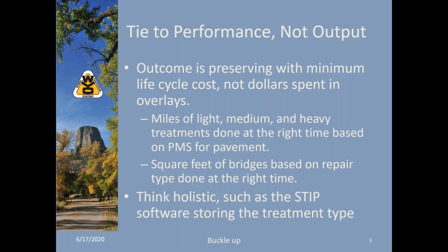For example, in Wyoming, we have what we call 1S, 2S, 3S treatments in our pavement. That could translate as light, medium, and heavy treatments done at the right time based on PMS for pavement. For bridges, it's square feet of bridges based on repair type done at the right time. That could be preservation, repair, minor rehab, rehab. There's a lot more in bridge. I'm not sure why, but there's a lot more in bridge. And embedded in the STIP software,